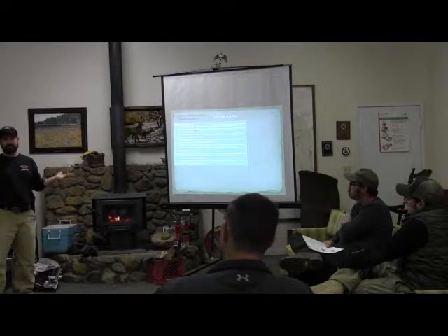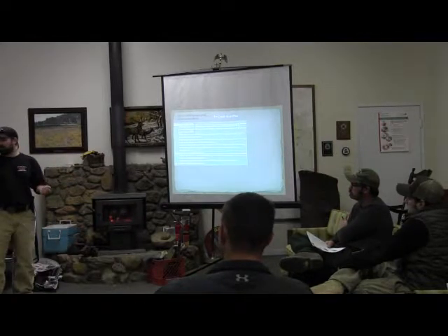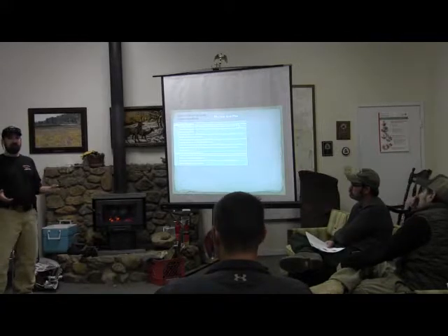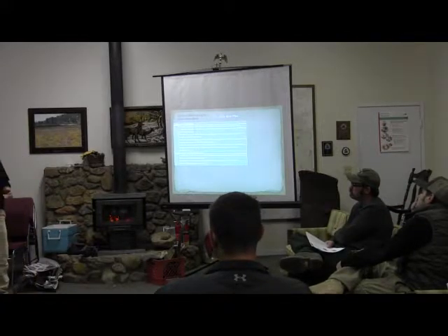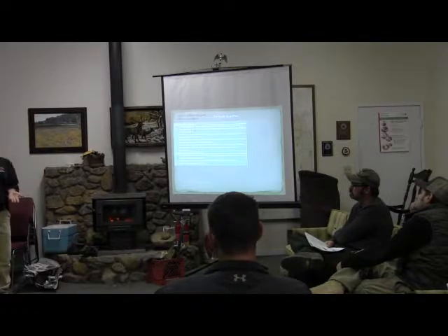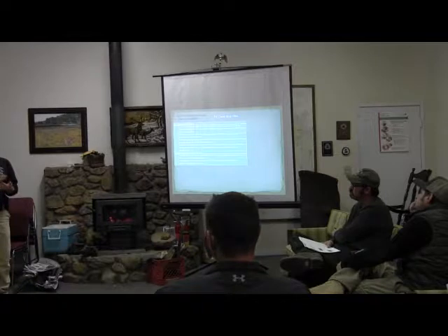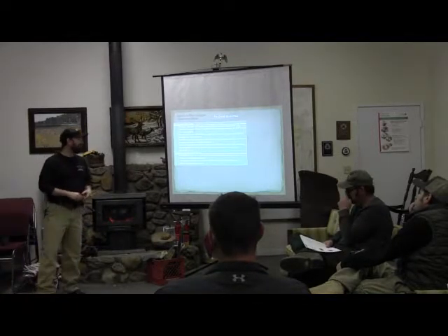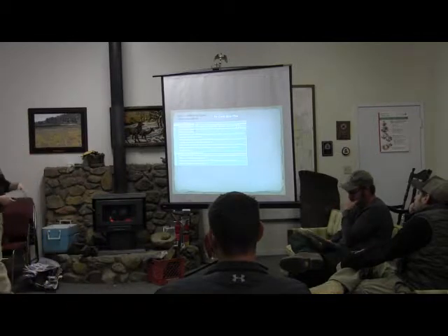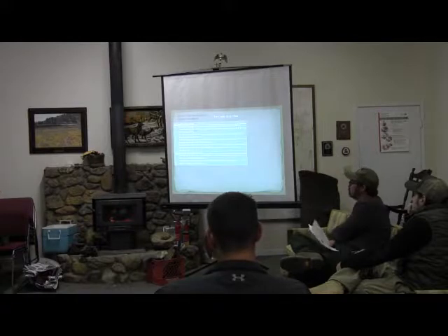A better objective would say, retain 60%, 70% of the original duff layer. That would give you a metric. If you need to retain 70% and it's a 10-inch duff layer, you could burn 3 inches off of it, right? Because that's retaining 70%. I can do math like that. So that's it: sample duff, pre and post, and observe the fire effects. It's not that hard, but otherwise, how do you know you've met that resource objective if you don't go through this process?